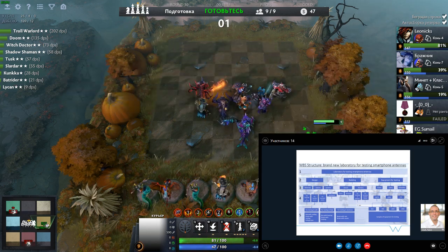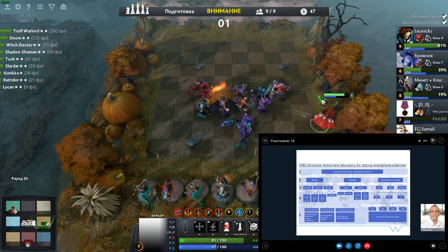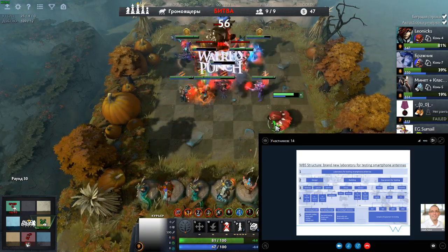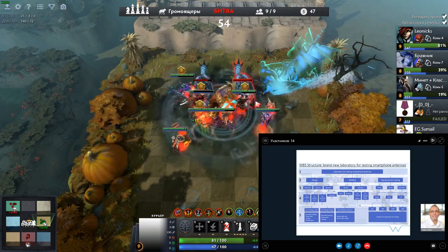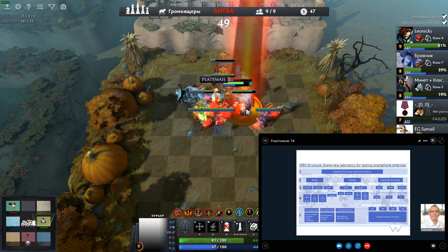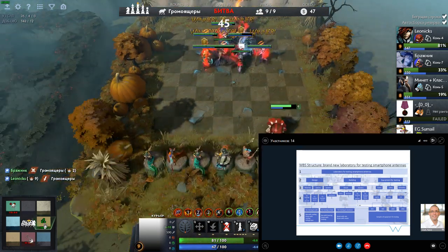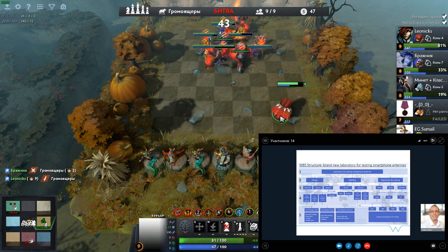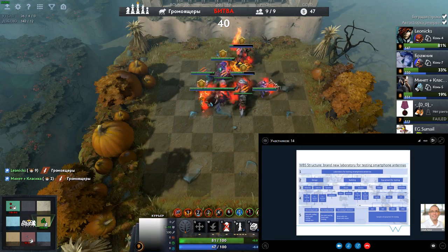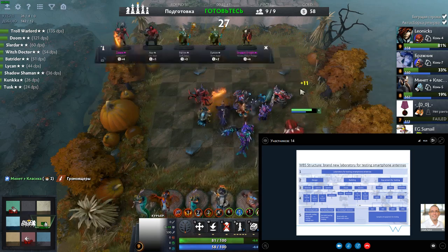That way what you're doing is you're focusing your work breakdown structure on the objects that are going to be produced and that are going to go to make the laboratory, rather than the process of doing something to help to get to that. Okay, so it's a subtlety, but it's an important subtlety to understand, because if you do, then you will be in a position to prepare stronger, clearer work breakdown structures as you move forward.